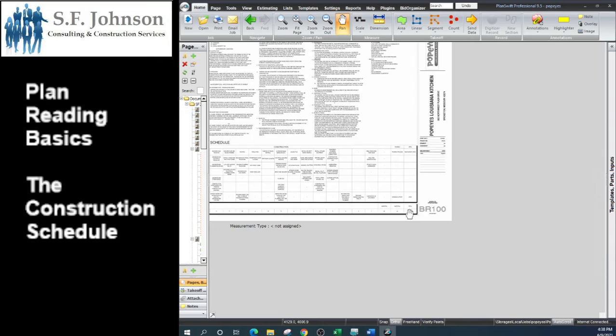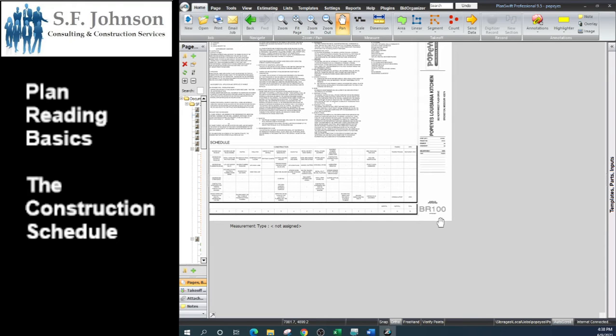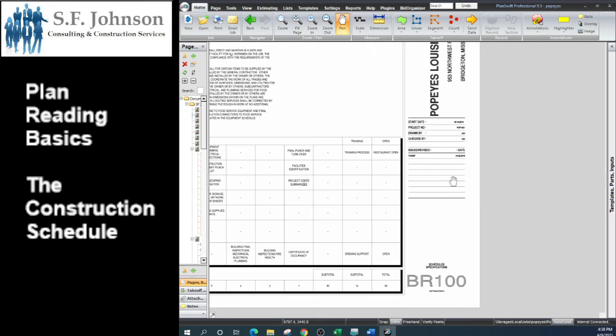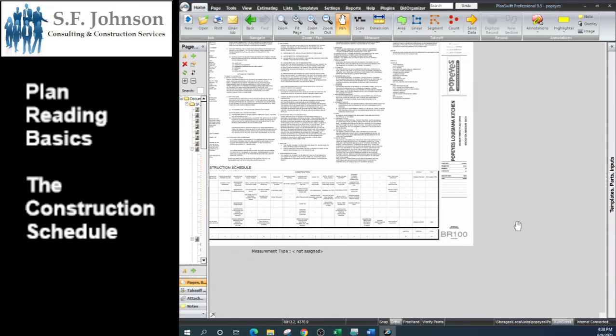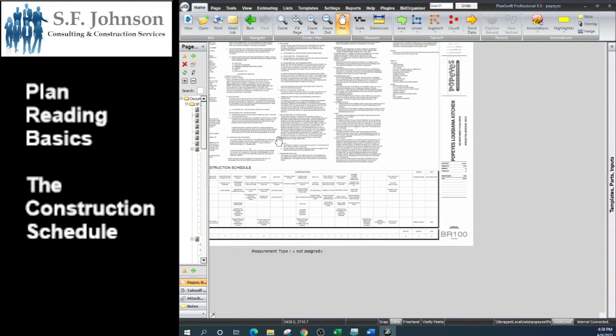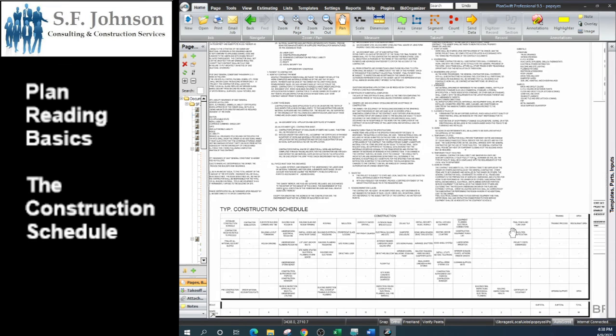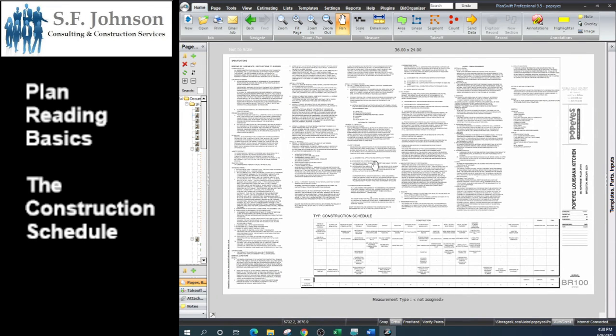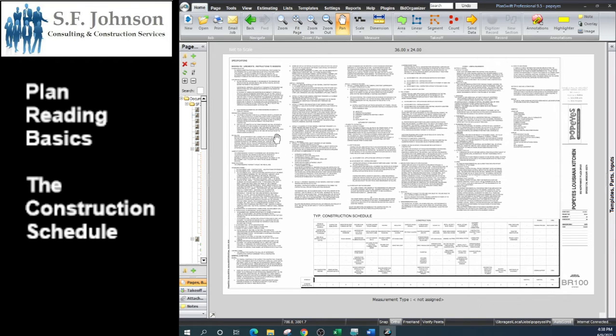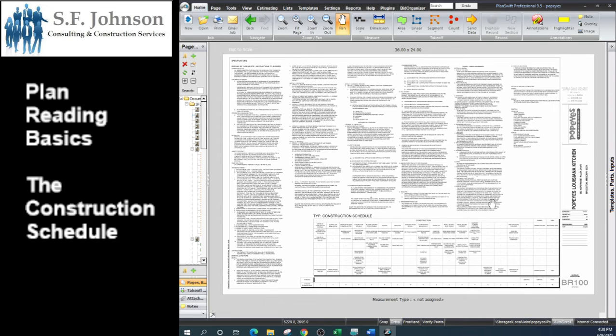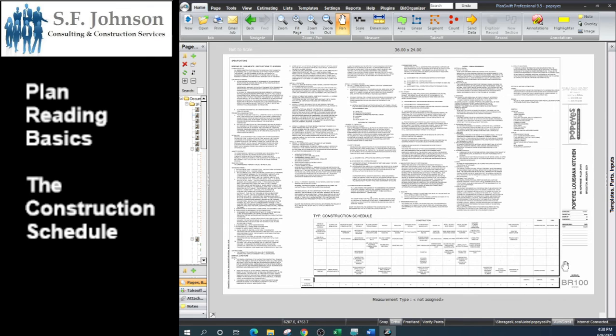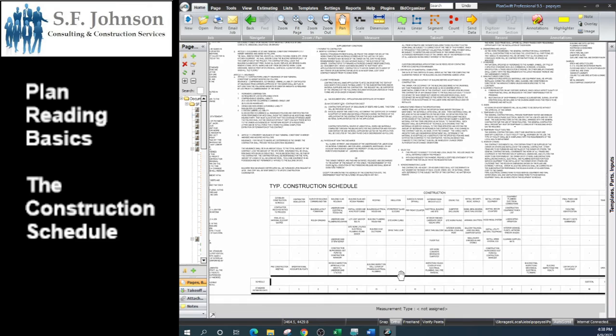So that's building a construction schedule and that's a separate class. This was pretty simple: bidding requirements BR-100. They've taken some of the items from the set of specifications, included it in the construction documents for ease of review. And also the typical construction schedule gives each of the contractors, the subs, an idea when they are to perform their scope of work: who comes first, who comes second.